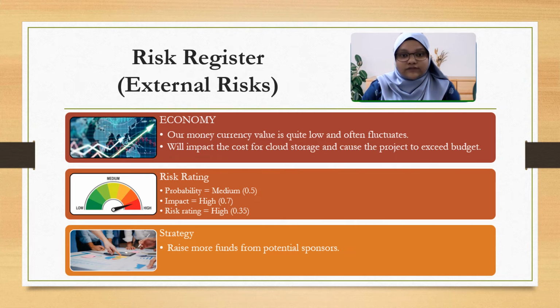The probability of this risk is medium, which is 0.5, and the impact is high, that is 0.7. Hence, the risk rating is high at 0.35. The strategy if the risk occurs is to raise more funds from potential sponsors.